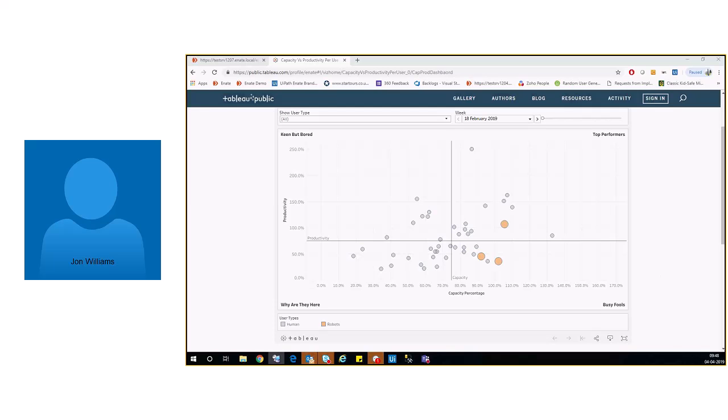But you might have 20 actions that stretch across those 5 dates, and you don't want to have to agree those internal dates with your client. So with our system, you can agree the key dates, the milestones for the process, and then we can use what we call an offset to be relative to those dates, so that everything doesn't all become due all at once. So we can spread things relative to those dates.